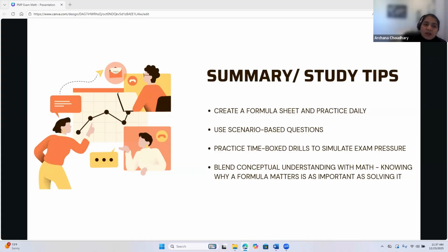Now, critical path. It is all about thinking what delays the project. You don't need full diagrams often; try to understand what the question means. The longest path is the critical path. Zero float is critical. A delay on the critical path means the project delays. A delay on a non-critical path may not impact the end date.